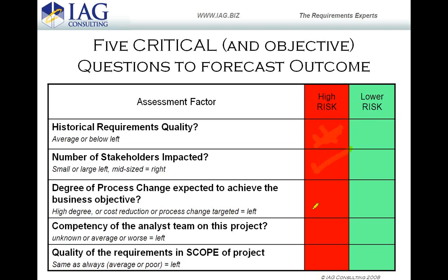Very high. Again, what you're dealing with is a scenario where it's a $3 million on average strategic project, but it's impacting a very small number of stakeholders. That's a very high-risk project. You've got to categorize it as that because they will push back and give you problems on following the process. They will not necessarily follow through on the commitments on the requirement side. So you need to make sure you're managing it very closely.